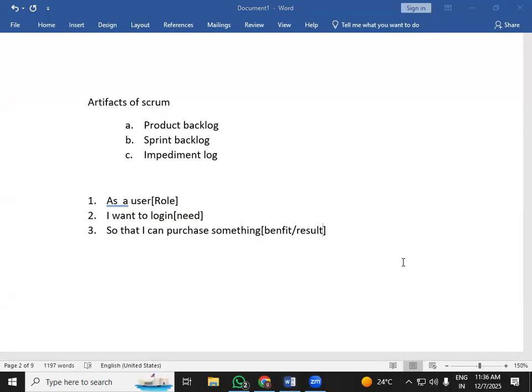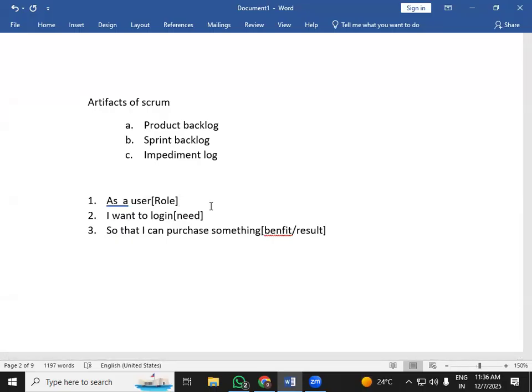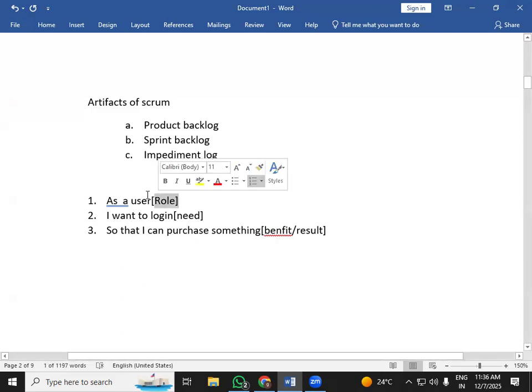Okay. So your typical user story will look like this, not point-wise, but they will be writing in this manner. They will be creating a small sticky note kind of thing and writing down: as a user, I want to do something so that I can get this. Here the role will keep on changing. It's not that the user story should always have a user.